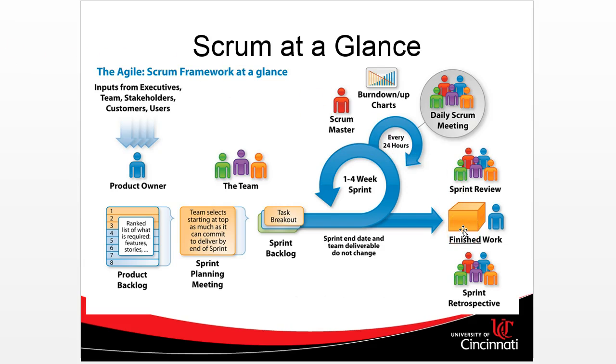At the end of the sprint, we're going to add up the story points that we tackled during that sprint, and that will give us an idea of how much currency we have to spend on story points for the next sprint. Story points will stay constant. If we rated something a 5 today, and we don't get to it for 3 months, it's still going to be a 5 in 3 months. What will change is our velocity. And the velocity is the sum of all the story points that we tackled in that sprint.